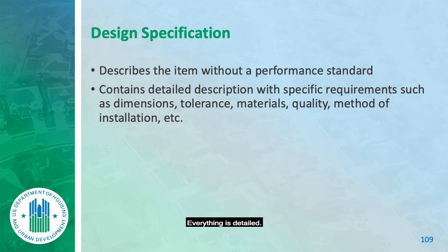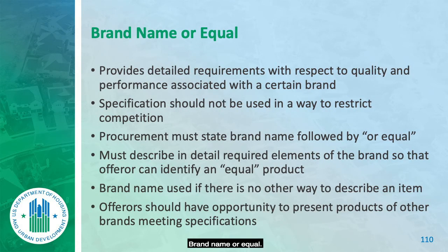Everything is detailed. Now, performance specs require you to use more open-mindedness in evaluation. And remember, performance specs are more difficult to oversee in the contract phase. Design specs don't require a lot of creativity on your part. You're getting a firm fixed fee. And then when you go to oversee the work, it's a lot less risky because you've got drawings, you've got designs.